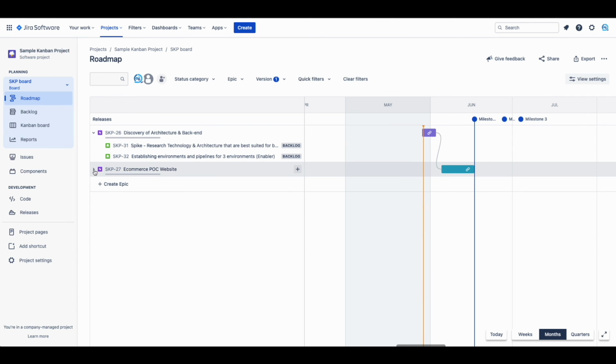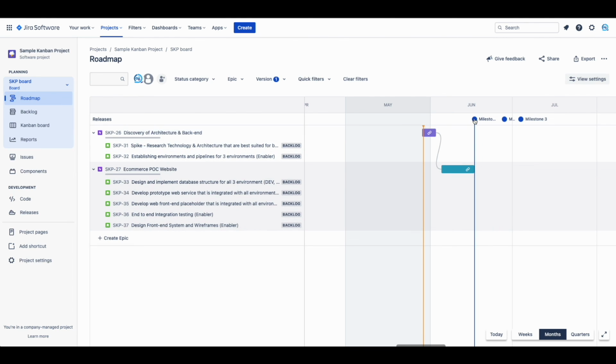Once your roadmap and your versions are created, it is important to monitor your team delivery towards these milestones on a regular basis. These 2 live artifacts, the Jira Roadmap and Jira Versions, are critical for keeping your team focused and on track towards your delivery goals. These 2 mechanisms are essential for communicating status and expectations to your stakeholders and business owners. It's recommended to have regular cadences with them, weekly or bi-weekly, to review the roadmap and milestone updates and discuss any project risks or blockers.